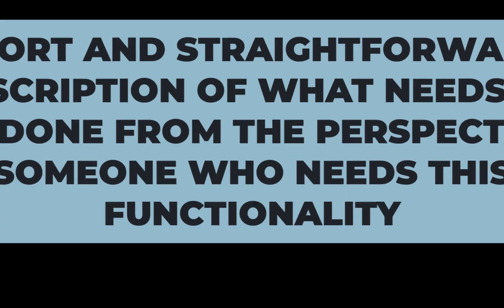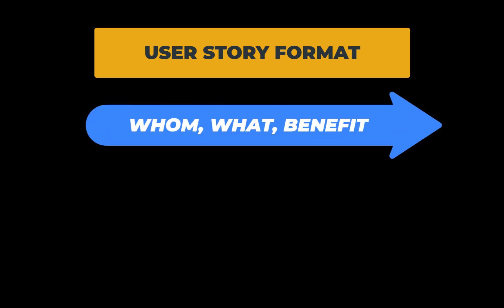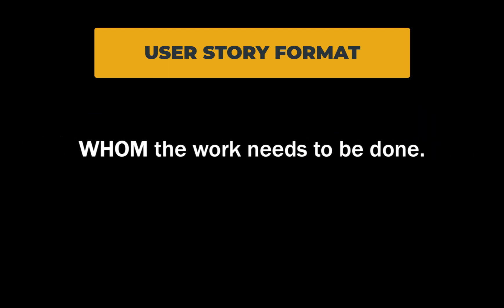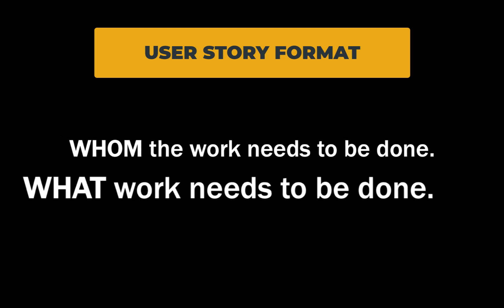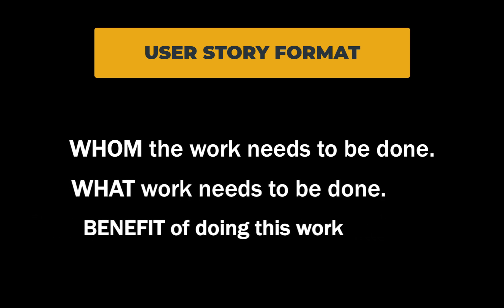Keep in mind that user stories are short and details are added later on. A user story format consists of three components: whom, what, and benefit — for whom the work needs to be done, what work needs to be done, and the benefit of doing this work.